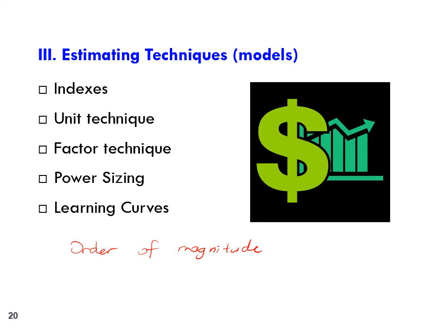Their level of accuracy is around plus or minus 30-50%. So these are less accurate, less costly alternatives, and they can be developed through conferences, questionnaires, some general equations, and so on. These are used in the planning and initial evaluation stage of a project. So this is the first one, order of magnitude.